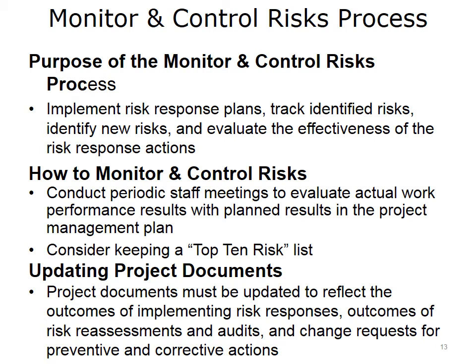The monitor and control risks process implements the response plans and evaluates the effectiveness of these actions while still scanning the environment for new risks. The project manager should conduct periodic staff meetings to track current risks, identify new risks, and review risk audit results. Can current risks be reassessed — are they still as high a priority as before? As a project manager, you may want to maintain a top 10 risk list so you are constantly aware of the top risks and their status. The project manager will update all project documents, including the risk register, to reflect the outcomes of risk responses.